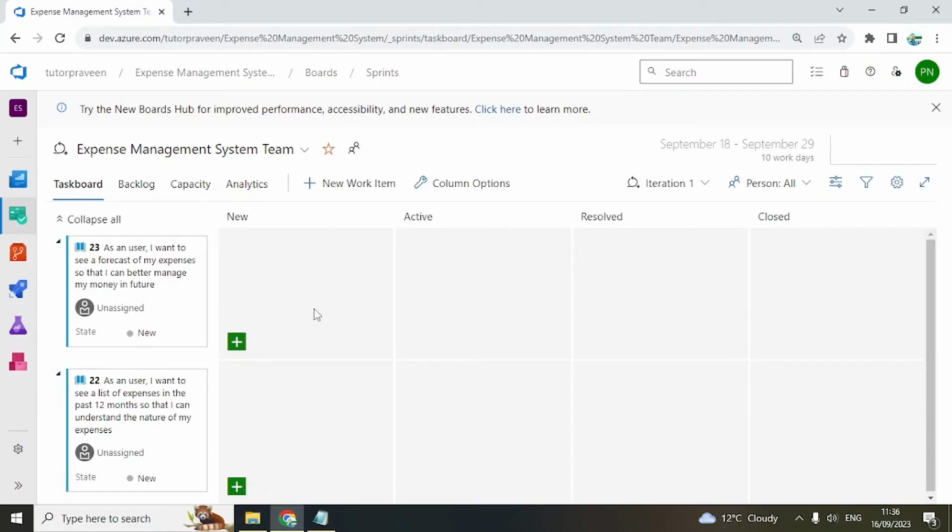Just to give you an example, now this story is even more complex. It is not a 5-point story now. The previous case was a 5-point story. Now it should be a 5 plus 3-point story. So it should be an 8-point story because the additional complexity is like 3-point. The already existing complexity is 5-point. So 5 plus 3, it is an 8-point story now. So like this, you increase the complexities.